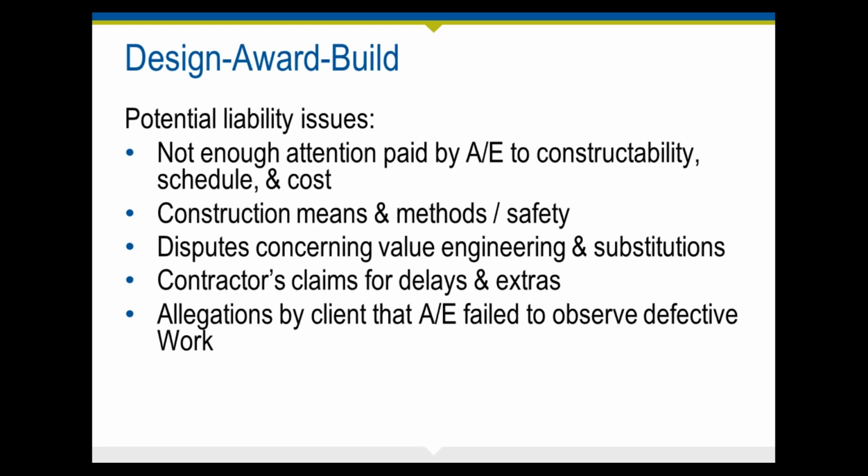Disputes over the value or quantity of work performed by the contractor, that's certainly been an issue during the construction phase. And the validity of contractors' claims for additional compensation or time extensions with the role of the design professional could certainly complicate the resolution of these items, all of which led to issues for clients making sure that their projects come in on time and under budget. And during and after construction, if the client alleges that the design professional was negligent for failing to observe and report defective work by the contractor, that could lead to an additional liability issue for the design professional.